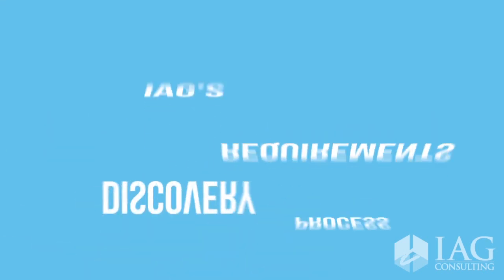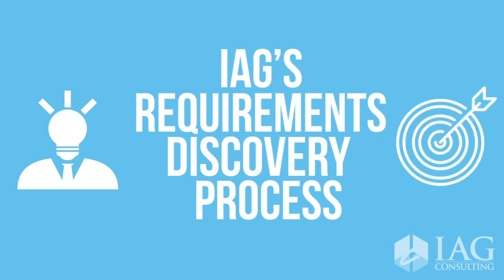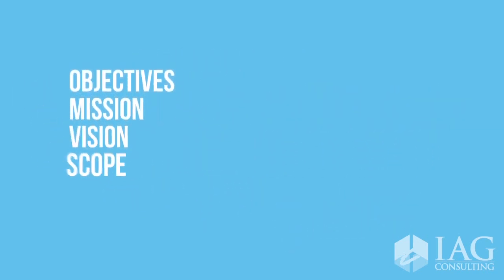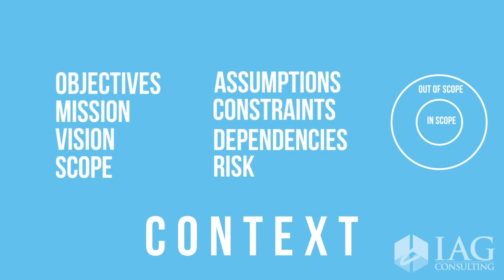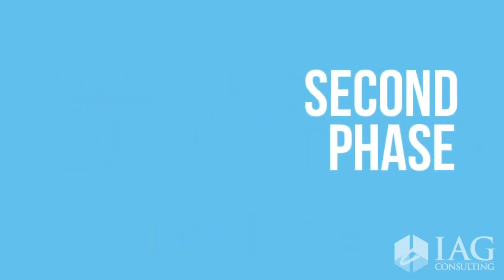How we did this was using IAG's requirements discovery process to elicit requirements from their subject matter experts in a rapid and accurate manner. What we did was we went through at the high level, phase 1, the objectives, the mission, the vision, and scope, the assumptions, constraints, dependencies, and risks, and the context. So we understood what was in scope and what wasn't in scope, and it also gave the client that view at the high level, what they were trying to do to allow them to build consensus internally, as well as create their RFI.